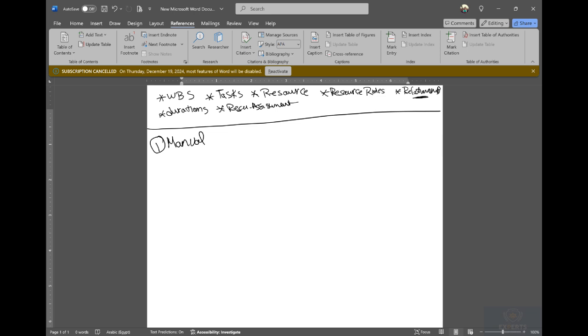Okay, and durations, we understand that it's coming from the tables which we calculate. We have the quantity, and we have the resource quantity or resource numbers, and productivity, so we get the duration, and we have the supplier schedule, so we can calculate the durations from here. And resource assignment is coming by loading all this resource needed from the tables into the activity.